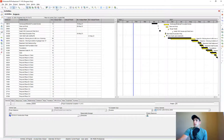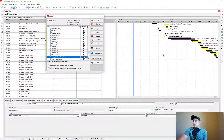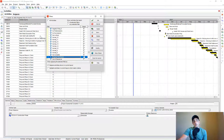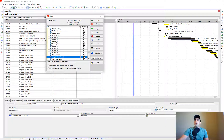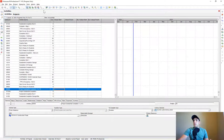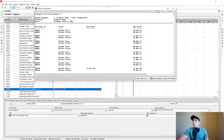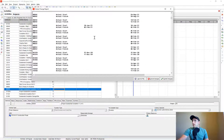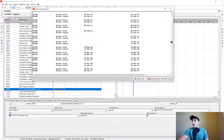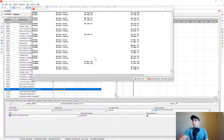Something interesting about Global Changes is that however you're filtered on your activities is how the global change is going to get applied — it filters for the same information. So let's make sure I'm filtered for all activities and apply that same 'completed tasks' change again. You can see the list is way more than I previously had, so let's go ahead and commit those changes.